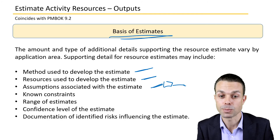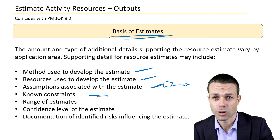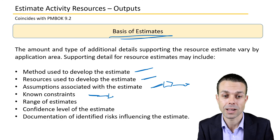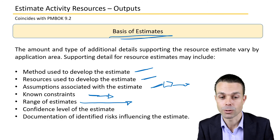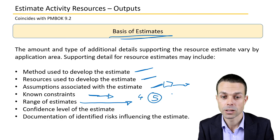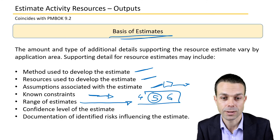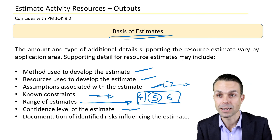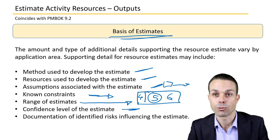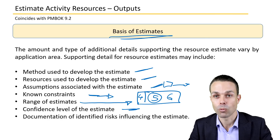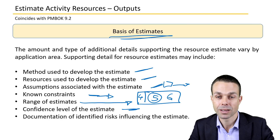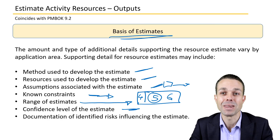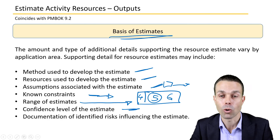The basis of estimates also captures constraints — for example, if John is on holiday for two weeks and can only start later — the range of estimates (e.g., five weeks needed, with a range of four to six weeks), the confidence level in the estimate, and documentation of identified risks. Risks might include someone leaving the organization, currency fluctuations if bringing in external or overseas resources, and other factors brainstormed with the risk or project team.